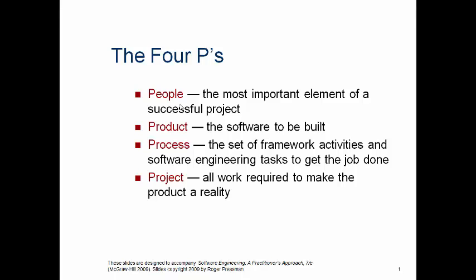The next focus is on the product. Product is nothing but the software that is going to be built. Before every project begins, the product objectives and their scopes should be established. Alternate solutions have to be considered. Technical and management constraints should be identified. Without this information, it is impossible to define reasonable estimates of the project cost, an effective assessment of project risk, a realistic breakdown of project tasks, or a manageable project schedule.